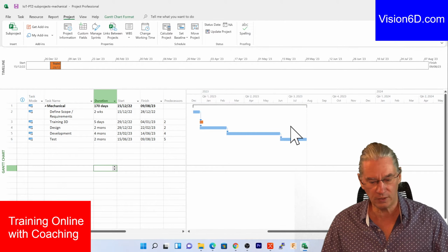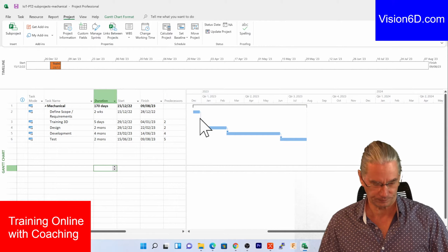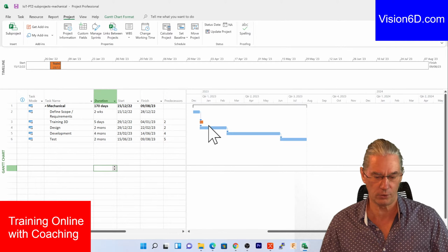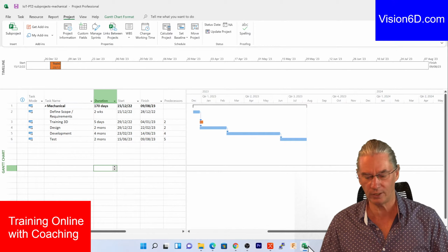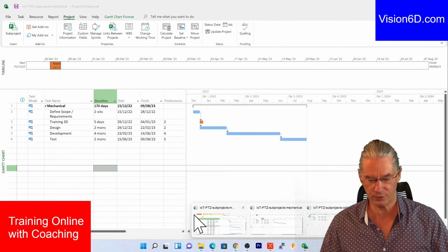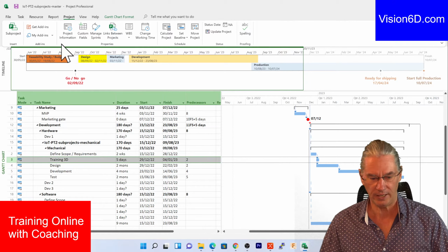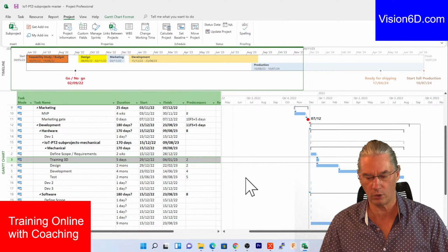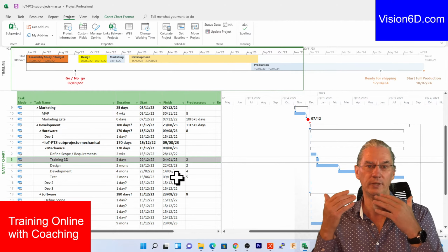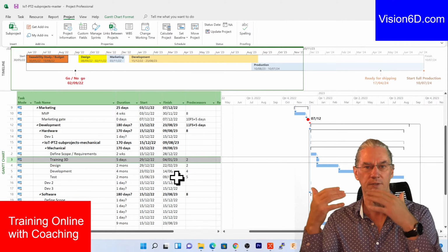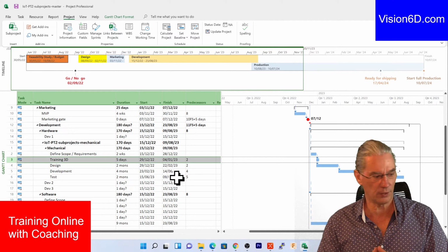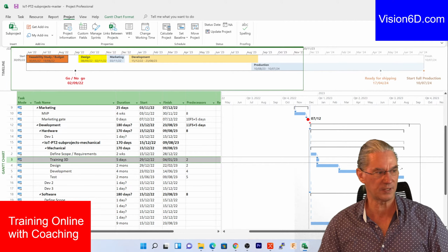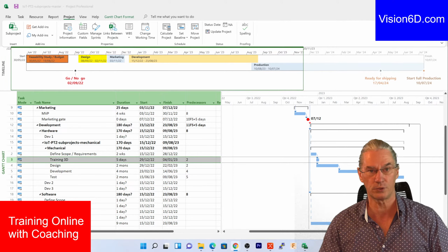And you see now that we have those expressions here, we have the timeline, and we are going to have a look at the master file timeline. And we don't see any training positioned here or anything. So it really means that your two timelines are absolutely independent.